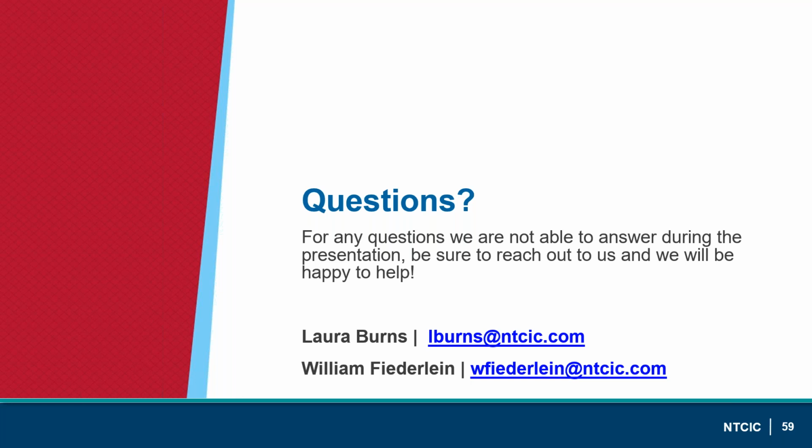But the process is very similar to closing on a construction loan, whereas you still have the similar due diligence associated with that, such as environmental, title, survey, things of that nature that an investor is going to need or that your bank would typically need to get a construction loan. And so that all leads into the lead times, along with things like an appraisal, can all add up to, say, 45, 60 days.